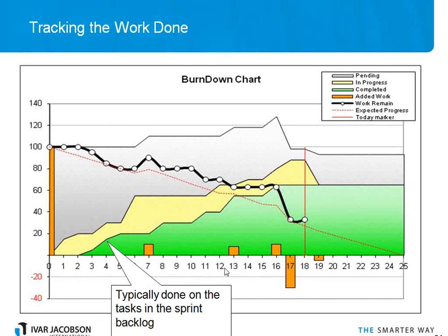Okay, so one of the things that we're going to do every iteration as part of our assessment is look at the graphs, look at the trends. Within that iteration assessment, we said, okay, this is our velocity, we're doing well, we're going to hit our original target, but it doesn't look like we'll have enough bandwidth to do those additional requirements that were added. What do you want to do? Do you want to give us an extra iteration, or should we adjust the scope? So the graphs give you a basis for discussions about what you should do. You need to take action on those.